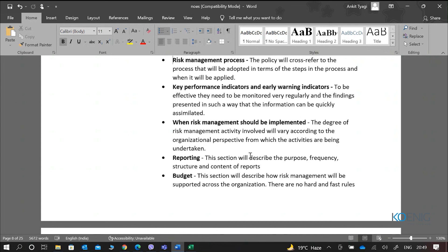The policy also talks about when risk management should be implemented. The degree of risk management activity will vary according to the organizational perspective — strategic, program, project, or operations. Based on the perspective we are looking at, we go ahead and implement the appropriate risk management activities. The reporting section describes the purpose, frequency, structure, and content of the reports — what format, what information would be in risk reports, and when risk reassessment would be done. All that information is put in a risk report and shared with the concerned people.